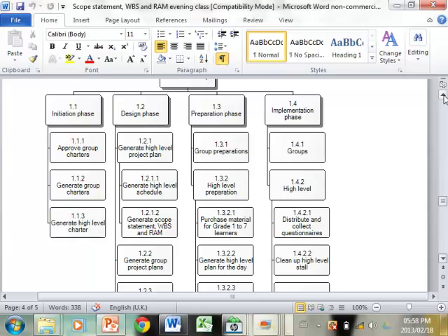roof over here. Okay, so these lines are important because they tell me that whatever is connected to structure makes up structure. And of course, this would have numbers, and this would maybe be 1.4, and so this would be 1.4.1, 1.4.2.